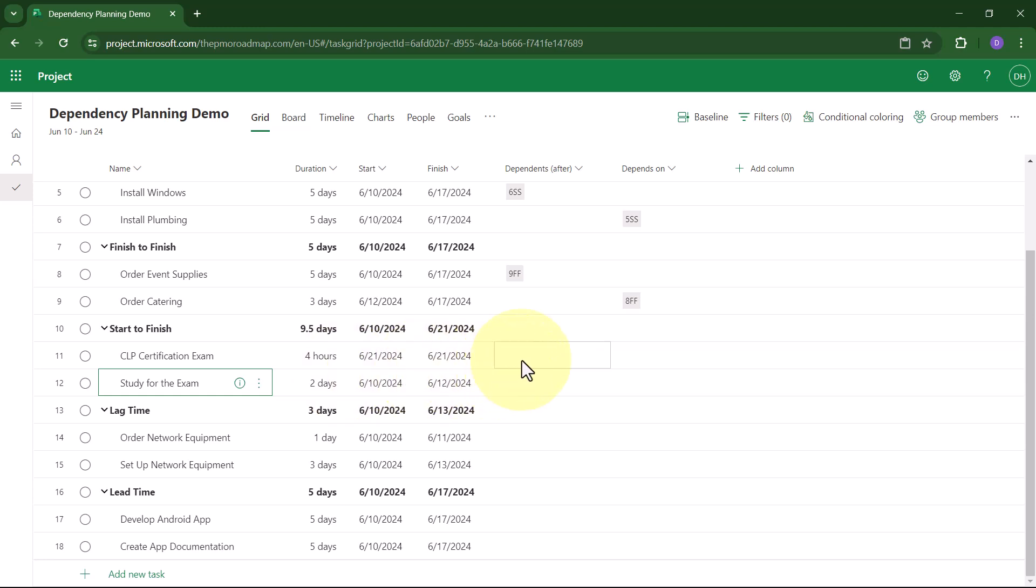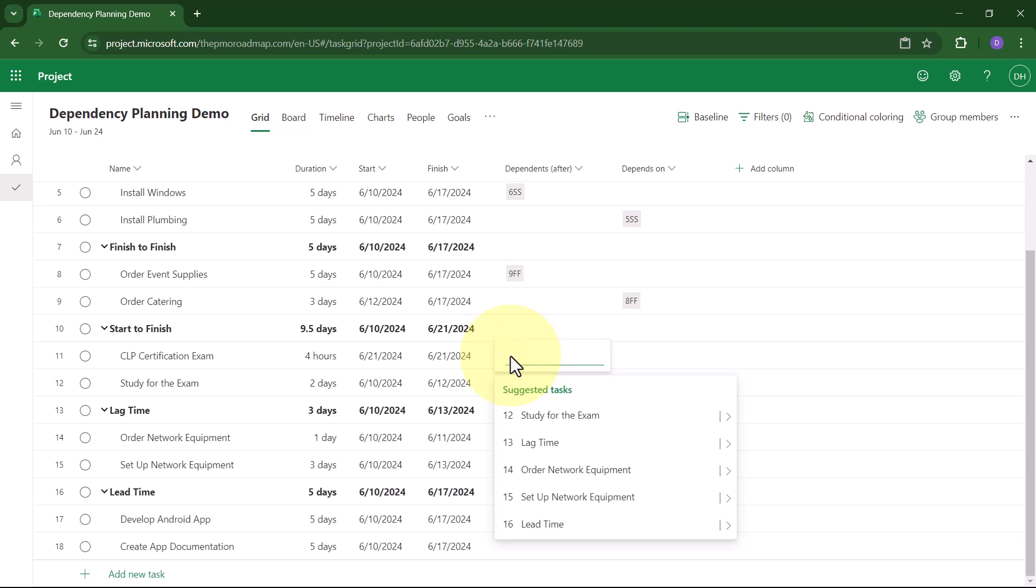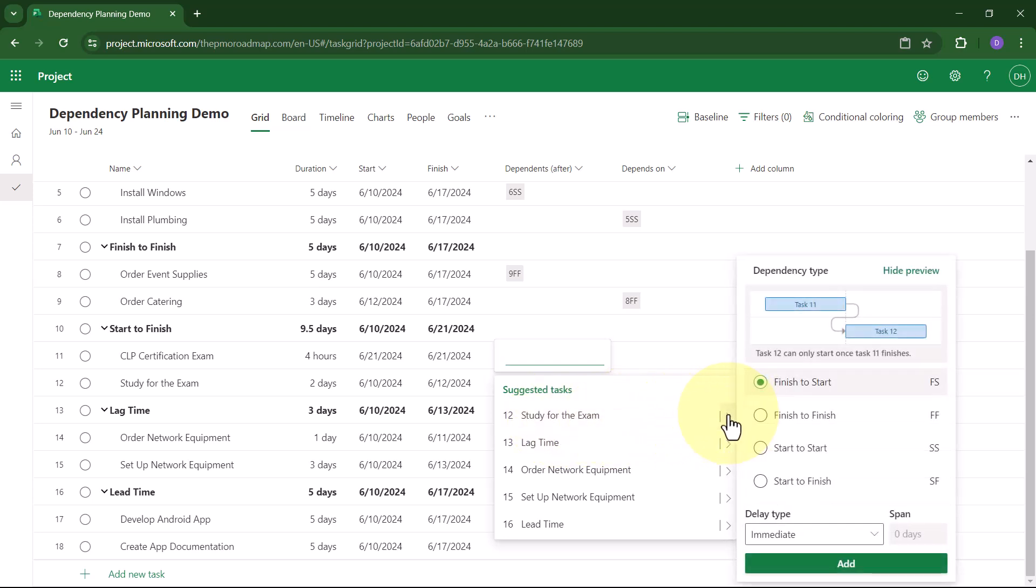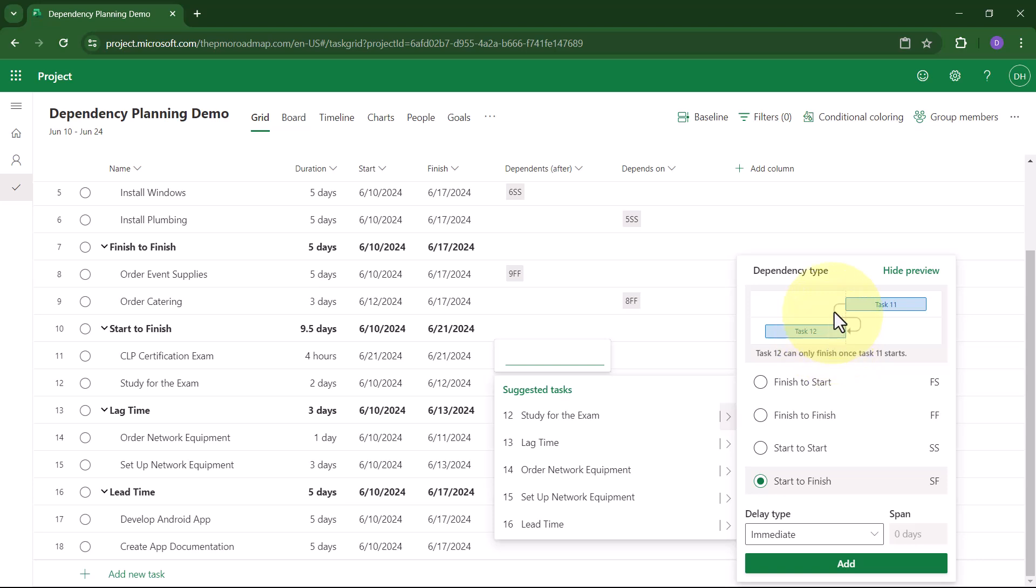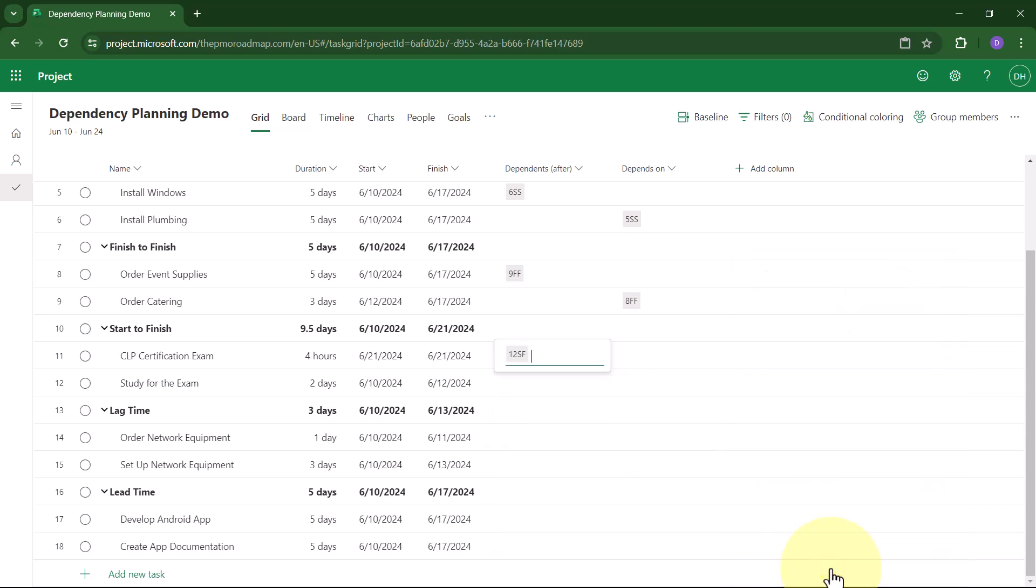I think you already know how to set that, but let me demo it for you. So again, I'll click anywhere in the Dependents After cell. I'll choose Study for the exam. I'll click the Flyout button, and here I'll choose Start-to-Finish. And there, look, it's the weird backwards dependency, but that's exactly what I need. So I'll click the Add button, and Project for the Web will create the weird backwards Start-to-Finish dependency.